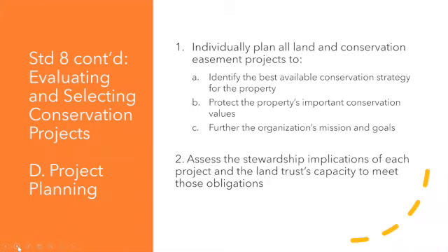All right, also important to project planning is the concept that each transaction should be individually planned, which importantly includes a close look at the prospective stewardship needs that are unique to the project. An obvious need is annual monitoring, of course, but monitoring a small, simple property is not at all the same prospect as monitoring a large, complicated shapefile. And beyond monitoring, there's also the potential for encroachment and trespass and the potential costs that are associated with that.